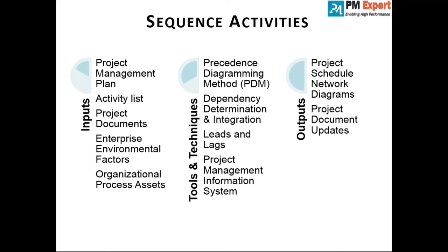Generally, when you have to fast track the project, to compress the schedule, you will follow lead. You will do activities in overlap. Does it make sense or not? Similarly, lag means when the predecessor is complete, you wait for some time, then start the successor.